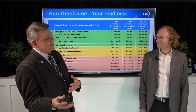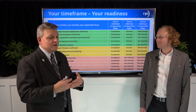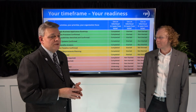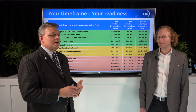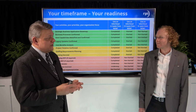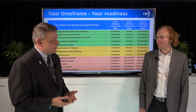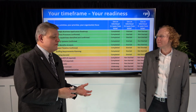And then the funding. If the funding is secured, in most instances it is secured, sometimes as part of that procurement process. And then the procure and implement: if you do the complete job of developing the approach and getting into the specifics, the better the RFP that is issued, the more clear and concise it is, the more relevant the responses will be, the more the costs will truly align to what will eventually happen.